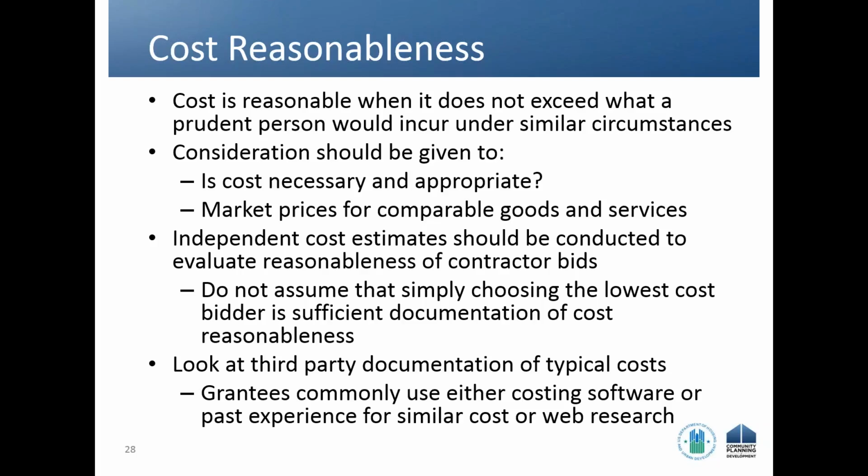One of the ways that people do this as part of procurement is to look at what's called an independent cost estimate. And this is a requirement for whenever you have to procure items. And so what that says is, prior to putting out your RFP or your invitation for bids or whatever you call it, you need to do an in-house cost estimate to say, given the scope of work that I am procuring, how much do I think this ought to cost?